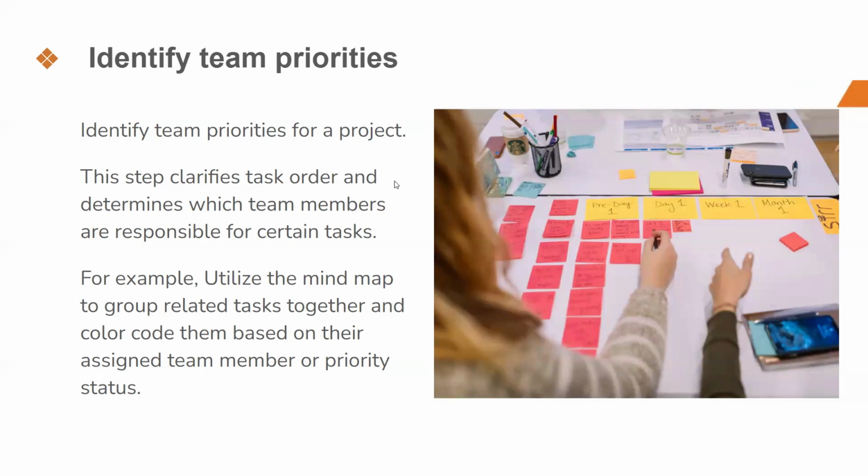That page was very important for them to show their stakeholders. So in the mind map, we had identified the first basic scenario: integrating the APIs for those areas, how to list down the products, and how to fetch the products into the product list and show it to them. That task we had to take first, rather than taking the whole dashboard in the first place.